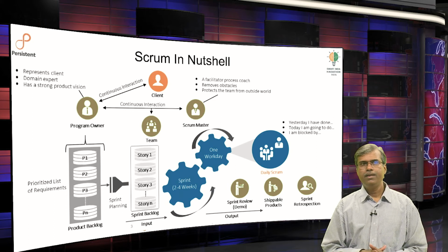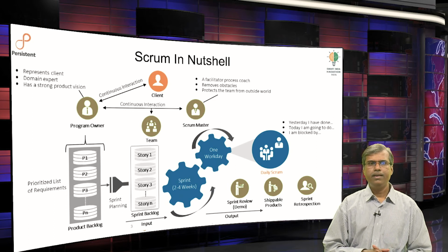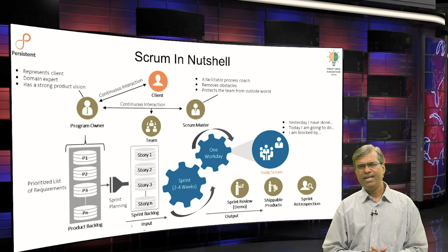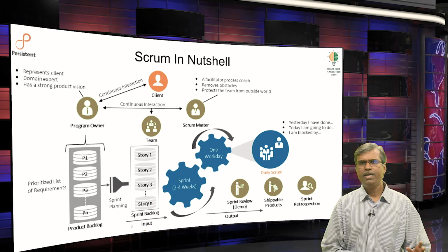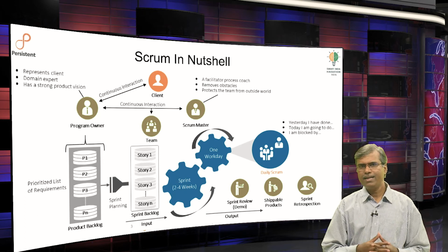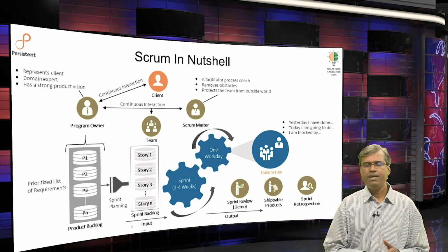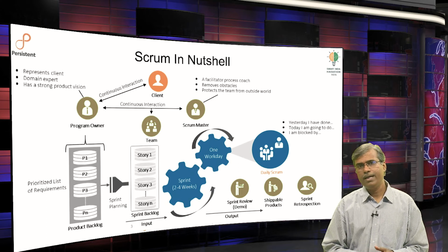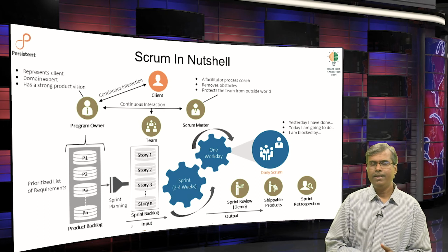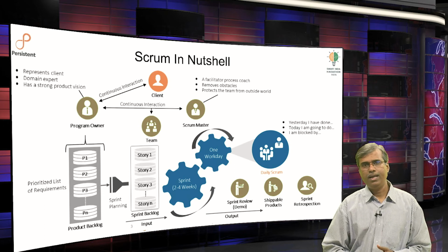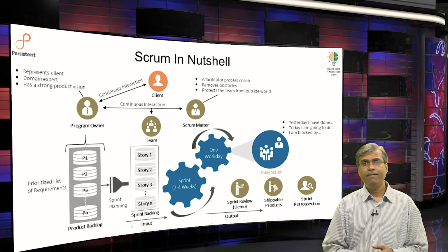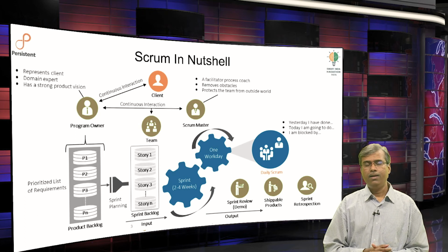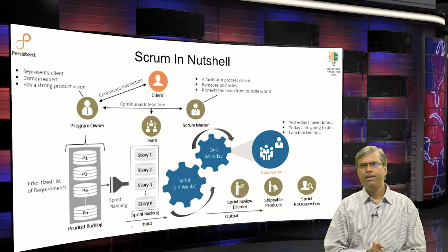During the stand up meetings, during the Scrums, the teams would conduct the stand up meetings, and as the name says, it is a quick stand up meeting, 15 minutes max, right. And the stand up meetings are helpful to know whether every team member is completing the task on time, and whether they know what is lying in front of them for the next days, and what are the issues or challenges that they are facing. So, the Scrum Master would know who needs help, and if there are any issues or impediments, how and when they could be resolved. So, it is a very simple and very straightforward way to know the progress.